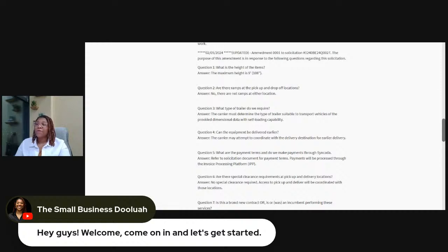It allows the vendor, also known as the contractor, to ask specific questions, and they have to give you a deadline for when those questions are due. After that deadline, it's up to the contracting officer whether to allow questions, but typically they don't, because they have to be able to provide answers to all of the questions they receive at that time.